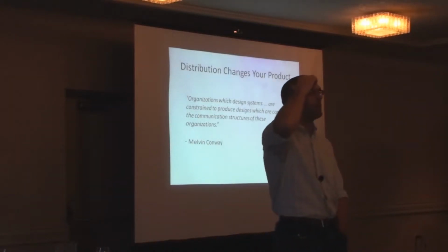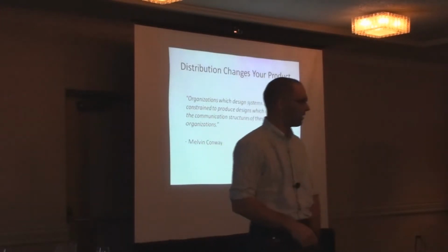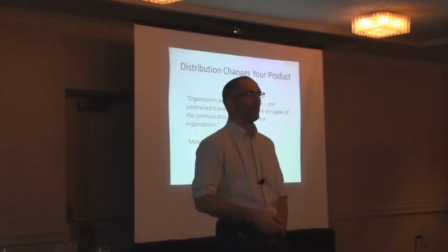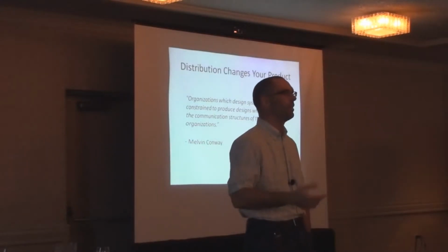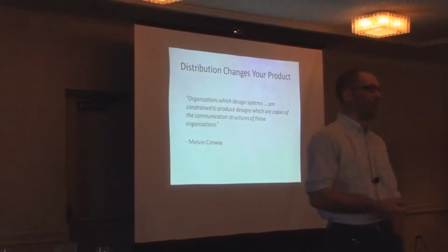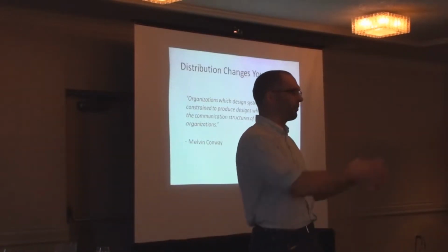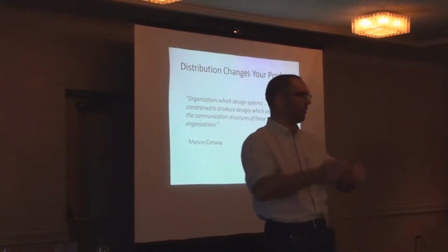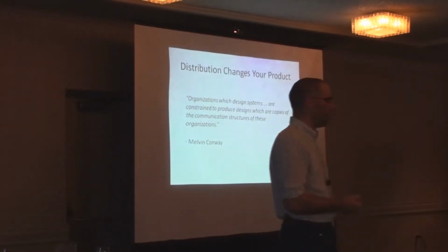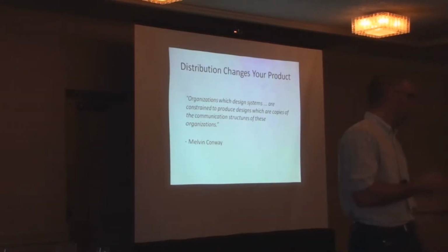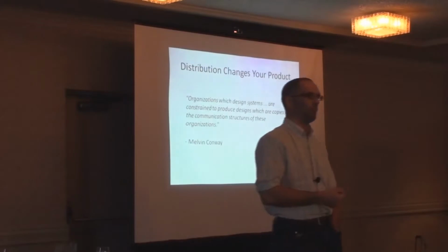Is anyone here familiar with Conway's law? So this is sort of the formal definition of Conway's law. What Conway's law really says is that if you have a team in Redmond, a team in New York, and another team in Paris, there's this nasty tendency for you to end up with 3 components. Things will just gravitate. One team will build this component, the other team will build that component. And it's a very natural way to split up the work. And there are some pluses to doing that. But the downside is that potentially your product can end up looking like your geographical distribution.